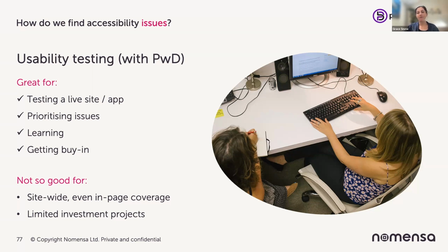But it's quite difficult to cover a lot of a website or application because you just can't get through that many pages. It's more about focusing on a couple of core journeys. It also means you need a pretty much finished product to test with. So you have to leave this very late in the process, which means if there is a core fundamental design problem, that can really scupper things because you've almost got to go right back to the beginning and redesign stuff to be able to test again. And realistically, most projects are not going to have the investment needed for this.